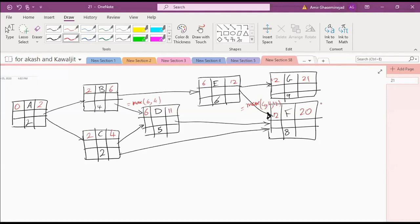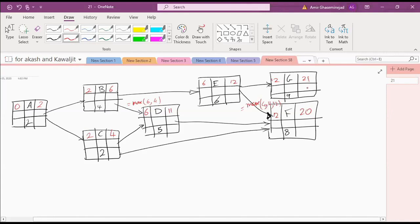Twenty-one. Very good. And what is the latest finish time for the project? Do we want the latest finish time to be twenty-two? No. Twenty-one? Yes. Can it be twenty? No, not unless we crash something. So the latest finish time, given earliest finish is twenty-one, is twenty-one.